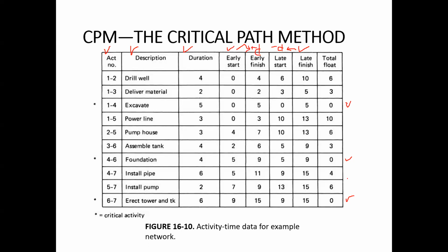These network calculations are the real numbers. Bar graphs are just like what we want the project to do. But in reality, it is very difficult to keep the logic of the activities. So although we may show something on the bar graph, if it is not based on the network calculations, it may not represent the true picture.